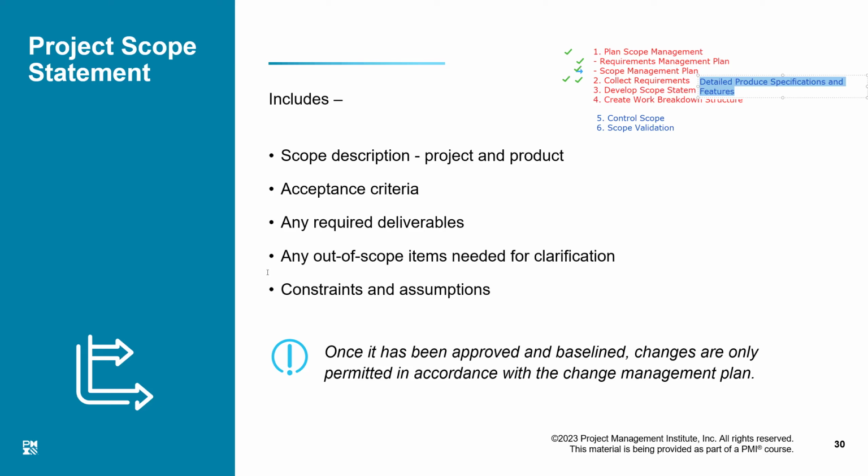So basically, in scope and out of scope is defined. But if a customer wants to add something to the project scope, we will have to discuss it with the customer. If that thing is minor, we may accommodate, and naturally we will have to revise our planning and our rates and our delivery dates accordingly. But if that thing is completely irrelevant and it is as big as the project itself, then probably we would say that no, it cannot be included in the scope. You could initiate it as a separate project, and we probably will do it, but not in this project. It could be within the scope of another project.